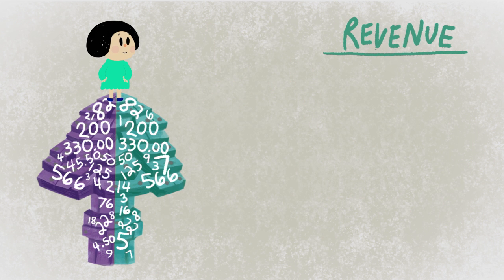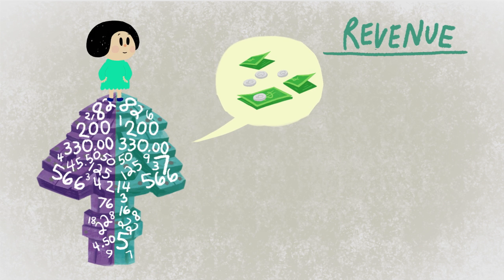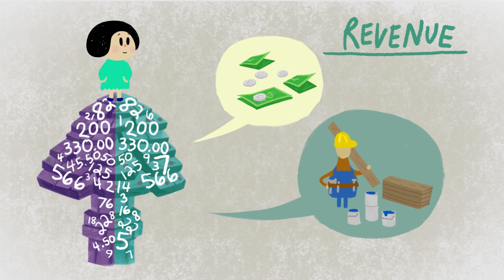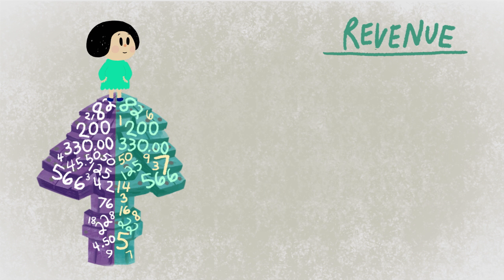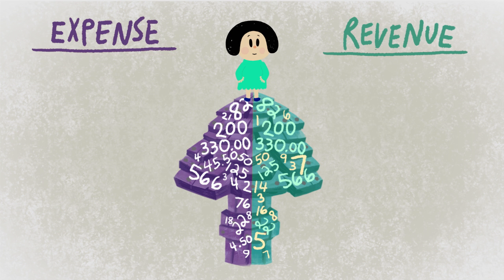The revenue side of the budget is composed of two sections. Cash revenue, all the confirmed or projected cash you anticipate coming into your project. And in-kind donations, any professional services or goods being donated to the project. A competitive proposal should have a diverse array of both cash and in-kind to put towards defraying the project expenses. In-kind donations must directly correspond to a line item on the expense side of your budget.